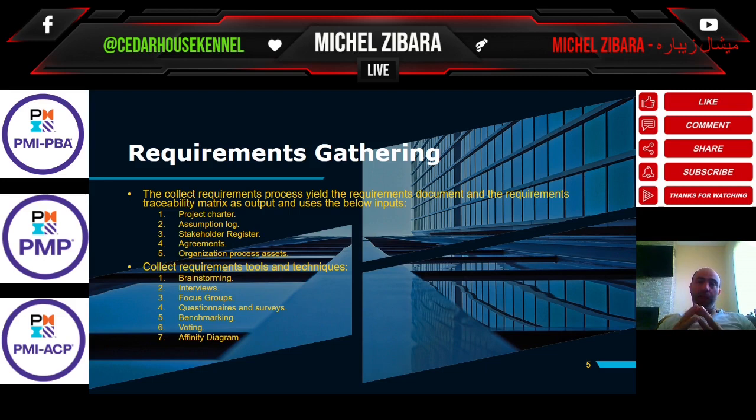Without a business case, there is no project charter. So the input to the project charter is the business case. The business case has a set of objectives and a description of why the project is needed or undertaken: business objectives, project objectives, risks, constraints, assumptions.